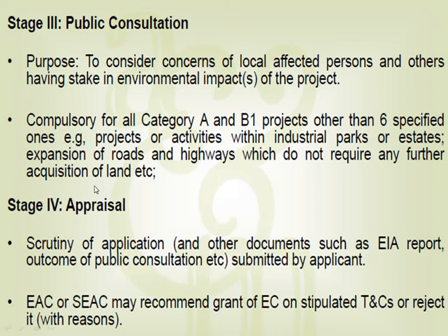Then appraisals. So public consultation: you provide the public a chance to voice opinions. If they have any concerns or grievances, they can express them. Scrutiny of applications and other documents like EIA reports and other public consultation material submitted by the applicant. So that is scrutinizing. Appraisal means scrutinizing. Then the ESC, SEAC, State ESC and SEAC may recommend grant of EC, non-clearance with stipulated terms and conditions, or reject with reasons.